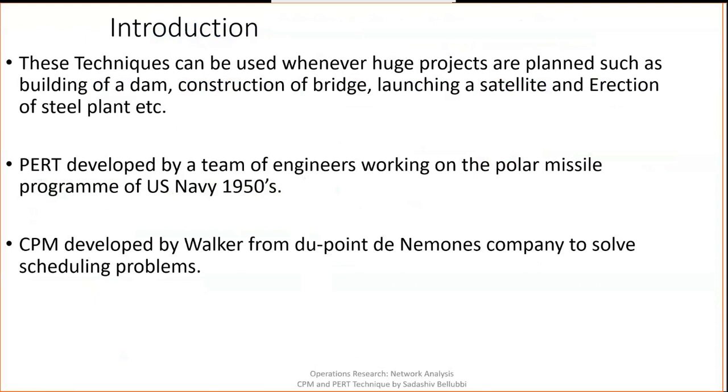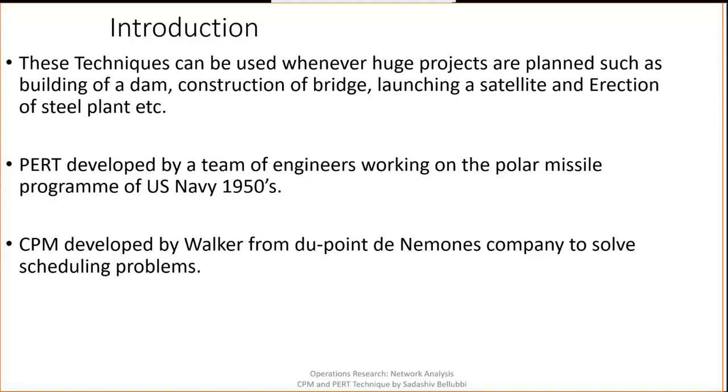So how can we adopt this? We can divide the huge project into a number of activities. Again, those activities can be divided into small activities. For each small activity, we need to specify what resources are required, how much time is required, and who are all the workers we require. So everything we can schedule.